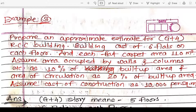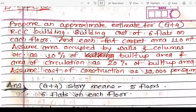Assume the area occupied by walls and columns as 10% of the built-up area, and the area of circulation as 20% of the built-up area. Assume the cost of construction as rupees 10,000 per square meter. In this problem, the RCC building has 5 floors — ground floor plus 4 floors.